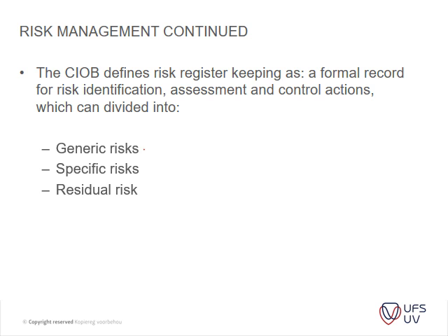For instance, the risk of oversupply of material, or if you over measured, or if you under measured and you have to ask for more material, or you have to send back material at a certain cost. So that's, for the contractor, an example of a generic cost.